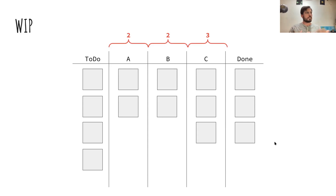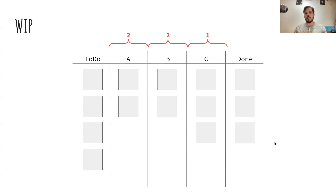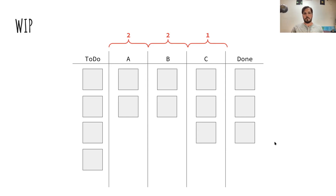WIP limits might look like two things in the first two columns and three in the third. But you might also be violating the WIP limit in one column — you made an agreement about how you'd work and then violated it. Now your WIP is varying, and if we go back to Little's Law, with WIP varying, we don't know what's going to happen to cycle time and throughput.